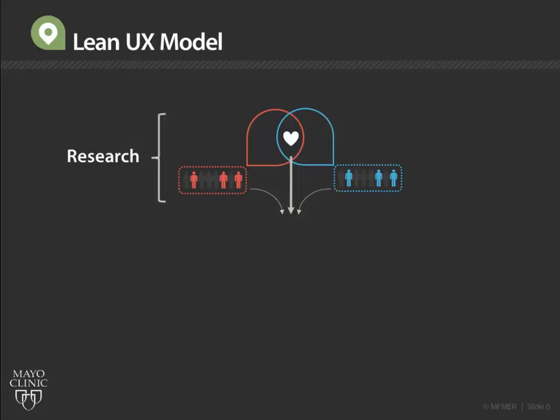Only after that can you find the sweet spot where the two cultures' needs intersect, and this is where design will occur. One common mistake is to start designing before the research has been accomplished. It's fine to doodle early ideas for your own use, but there is a strong tendency for proponents, and for designers too, to become really attached to a specific approach before research is complete, and without going through sufficient design test analysis cycles. So I recommend that if ideas for possible solutions come to you during the research phase, document it lightly and put it aside to be tested later.